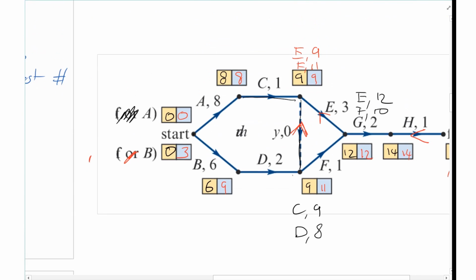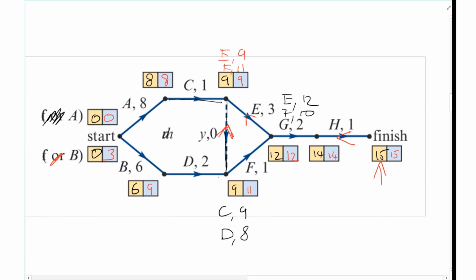So let's go back up to here. So if we look at this, anywhere we got 0, this is going to be a critical part of the critical path. If I go down for F, I've got a float time of 2. Here, I've got nothing, it's 9, so it's going to be 0. Part of the critical path, part of the critical path. Okay, so that's your critical path.